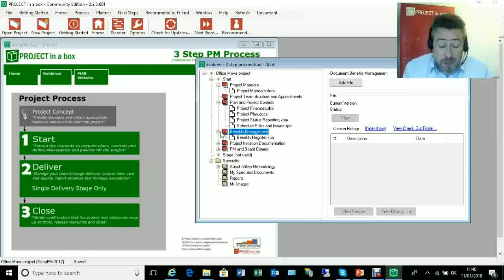But if we're doing it as a commercial project to save money or to make money, we need to understand how exactly that is broken down, when those benefits are going to come, what they're likely to be, because that's a good test of the business case of the project. If we're going to generate benefits of £100,000 from this project, but the project's going to cost £90,000 to do, then there's not much margin between those two figures.